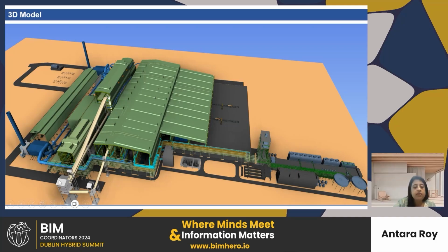If you see this area, it is still at 30% because only how the structure looks is showcased here. And this piping is in the 60% model, because connection details are not available. But if you see inside the structures, the 90% model is available.